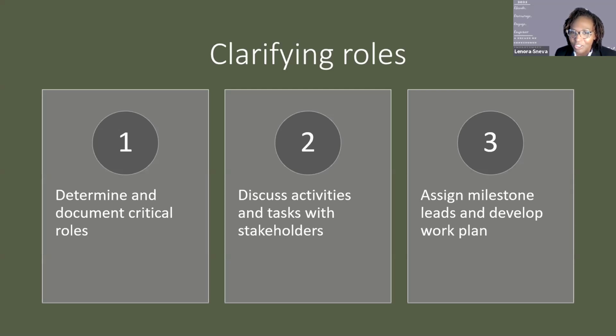As the project manager for the Washington Recovery Group, I was also the OCM manager and the meeting planner. I quickly realized that I needed help, and I found a willing person to help plan and facilitate meetings. For any large projects, you will need to identify a sponsor, an OCM advisor, a project manager, administrative support, and find out who your impacted stakeholders are. Don't plan to do this all by yourself or just with a sponsor.